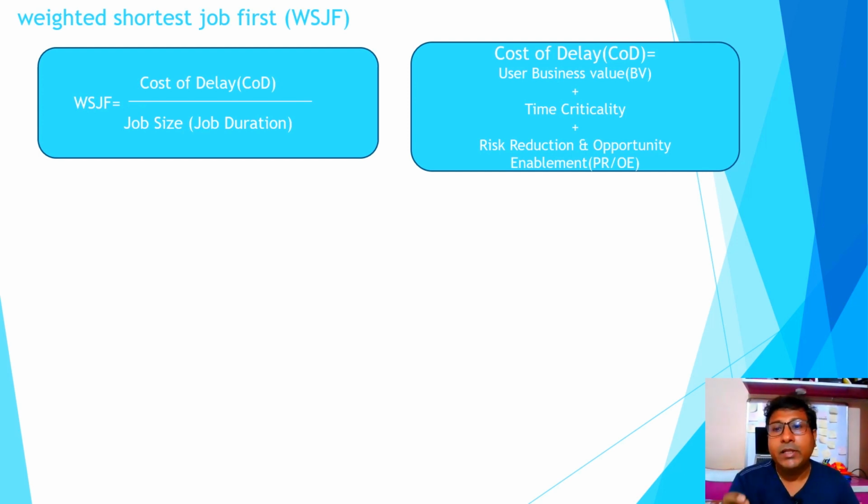What is the business criticality or business value? That means if this feature is not delivered, what will be the potential impact? What will be the penalty clause involved, and what will be the significance? Considering these different parameters, the PO or business user gives a certain rating or ranking. We term that the business value rating, and this is a relative rating.